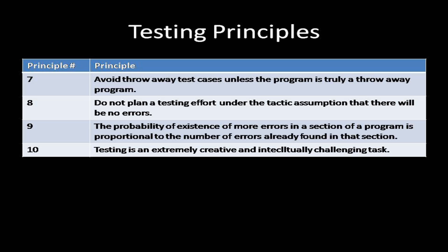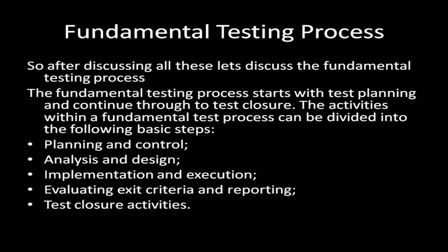Methodologies discussed later in this book let you develop a reasonable set of test cases for a program, but these methodologies still require a significant amount of creativity. The fundamental testing process starts with test planning and continues through to test closure. As we have seen, although executing tests is important, we also need a plan of action and a report on the outcome of testing. Project and test plans should include time to be spent on planning the tests, designing test cases, preparing for execution, and evaluating status.